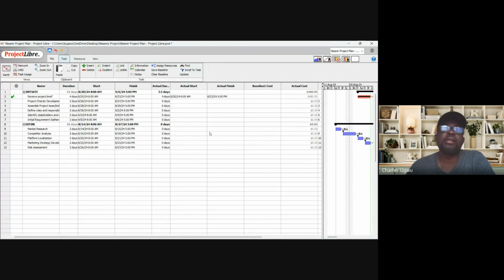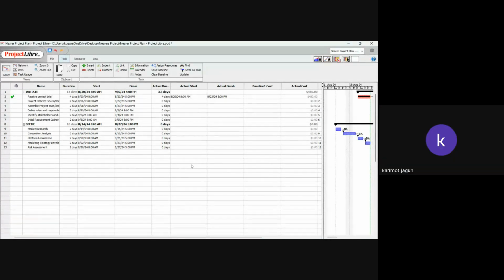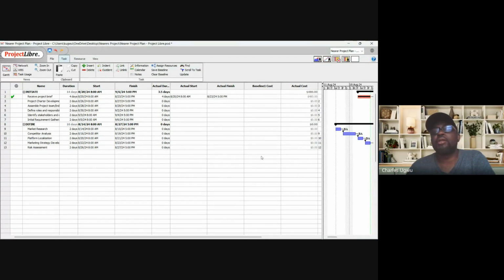These are your resources, that's why you have material costs and work costs. Work costs are human resources. So anybody that is a project team member that receives salary from working on this project, you must add all of them. We added project manager and business analyst because that's the only ones we have for now. Okay, thank you, sir. All right.